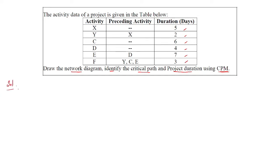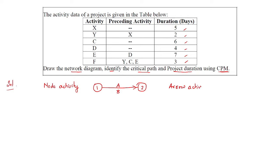Now let us look at the solution. We are going to prepare an arrow or node activity diagram. A node is prepared between activities shown with an arrow mark and another node — this is the first node, this is the second node. The activity label is written on the arrow and the duration is written alongside. This is the arrow activity format where nodes are connected by activity arrows and we are provided with activities and durations to connect the nodes.